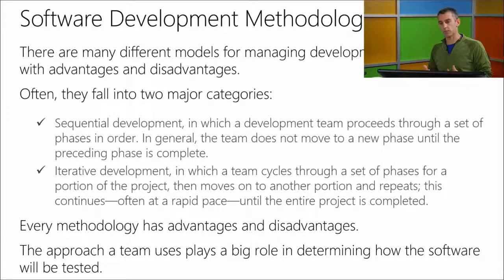Before you can leave that envisioning phase, there is exit criteria you need to meet, and then there's a phase gate. Before you can enter the requirements phase, all of the tasks in the envisioning phase need to be complete, and that phase needs to be signed off, and you've got a meeting where everyone agrees that you're leaving one phase and entering the next. Sounds like a lot of documentation on that one. It's a lot of documentation, a lot of planning up front, and a lot of coordination.